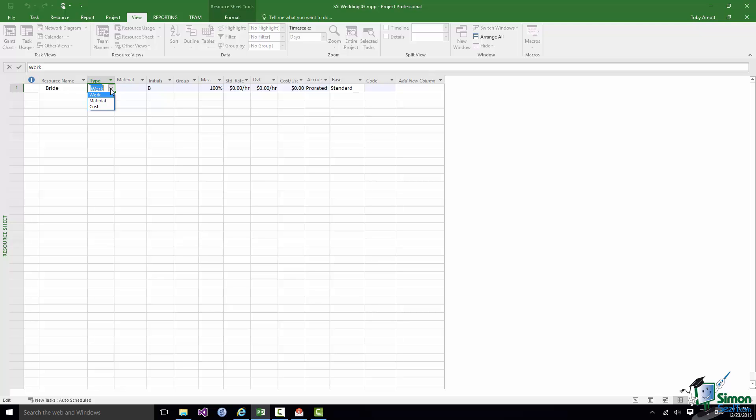We expect them to perform tasks and complete work rather than, as in the case of materials, be consumed by a job, used up in doing a particular task. Or a cost where we basically say with a task that it has a certain cost but isn't necessarily performed by an individual or involve the consumption of some kind of material. We're going to see examples of each of these three resource types. But we're going to work for the moment on the principle that when we add people we're adding work resources generally.